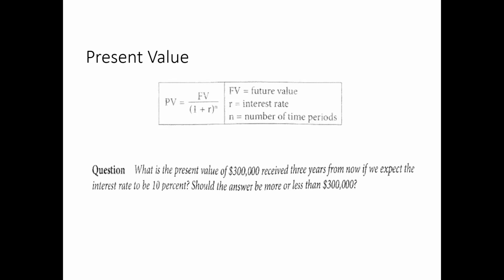And then we have present value, net present value, the internal rate of return, the payback period, and the cost benefit analysis, which are part of the economic models. So what is basically a net present value? So present value is equal to future value divided by 1 plus interest rate to the power of n, that is, the number of time periods.